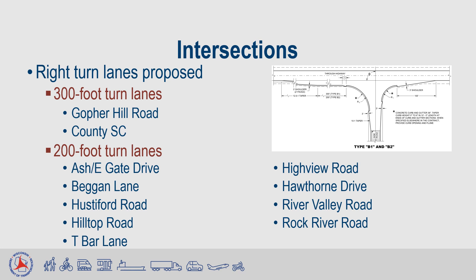Another issue brought up at the public involvement meeting was the lack of turn lanes along Wisconsin 16 throughout the two-lane section of roadway. Based on a review of the traffic volumes along Wisconsin 16 and on the side roads, right-turn lanes will be installed at all the intersections within the pavement replacement project. Full-length turn lanes measuring 300 feet are proposed at Gopher Hill Road and County SC, and 200-foot full-width turn lanes are proposed at the other intersections within the corridor as listed on the slide.